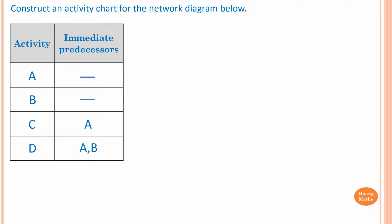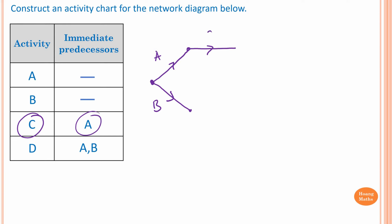We know Activity A and B have no immediate predecessor — in other words, there are no prerequisites for Activity A and B. So I just draw Activity A first, and this is Activity B. In order to do Activity C, we need to complete Activity A first, so I draw a line here — this is Activity C.